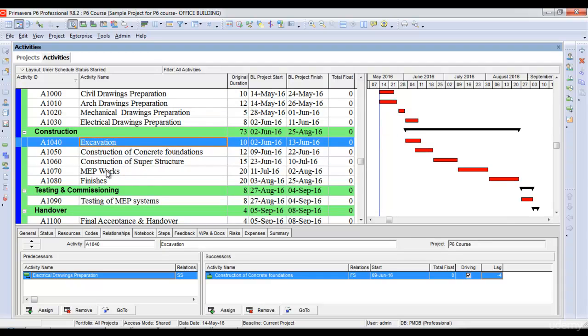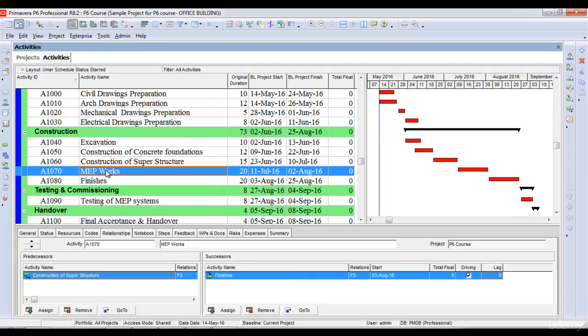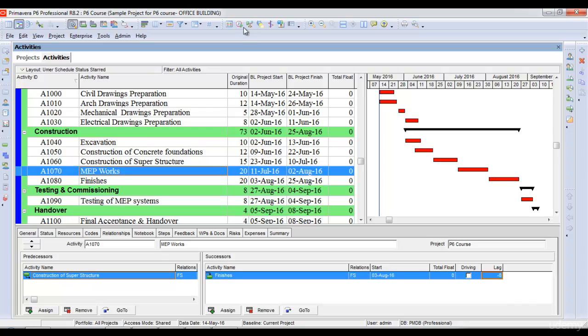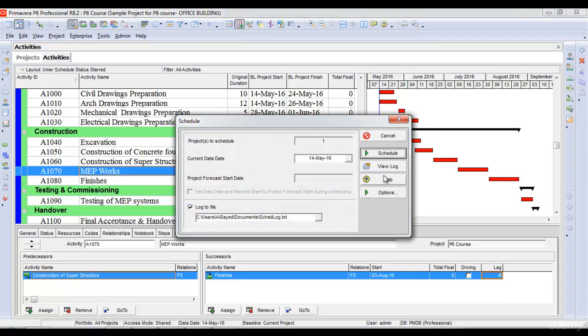Similarly, if I want MEP works and finishes to overlap, I don't want to wait the full 20 days. I'll set finishes to start eight days before MEP completion. I'll put a lag of minus eight days and schedule my project again.